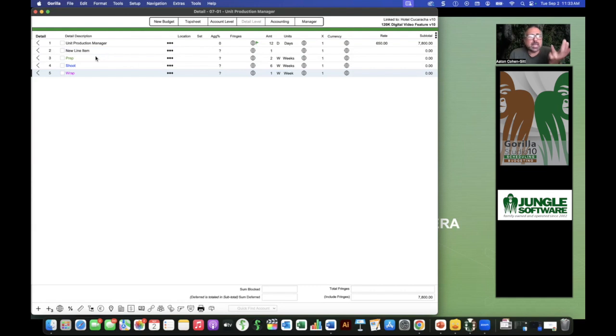So if I were to go in and say, okay, this guy is going to be $200. The shoot will also be 200. For the wrap, it'll also be 200. Whatever, we could do whatever you want, right? Or you could set the global, right? It'll automatically calculate 400, 1200, 200 over here on the right because we've got 2, 6, and 1 multiplying: 2 times 200, 6 times 200, 1 times 200, right? So you can see how prep, shoot, wrap can also be very helpful if you set that up properly. Okay? All right.